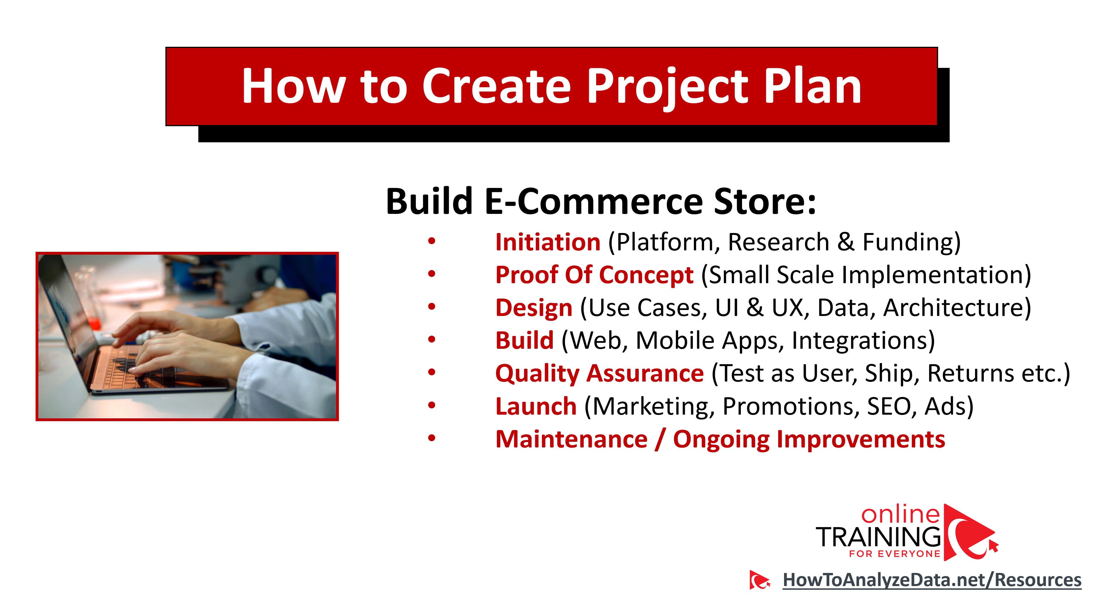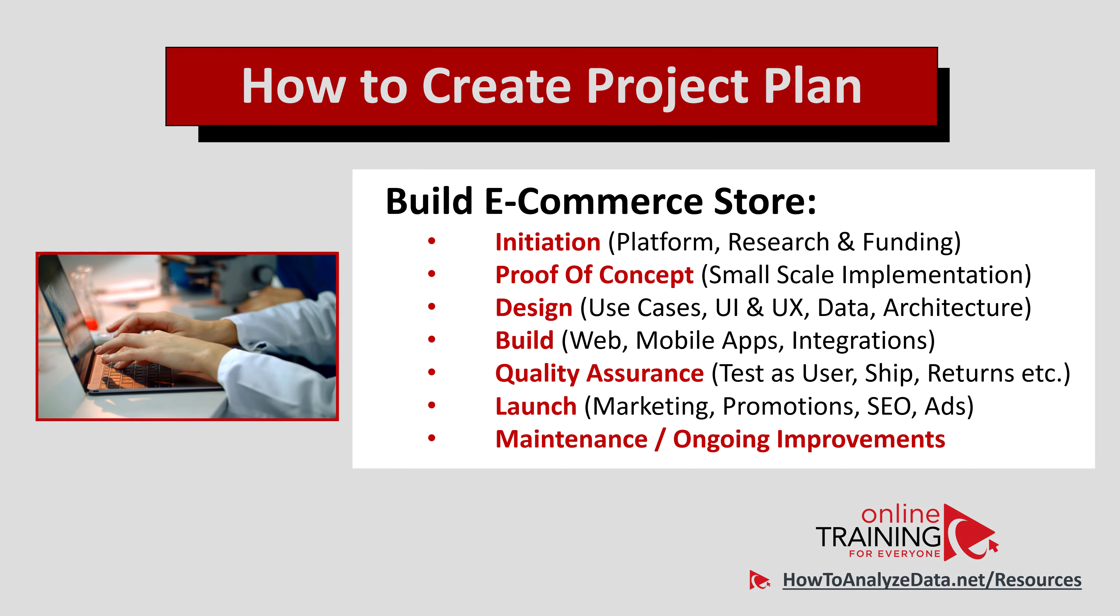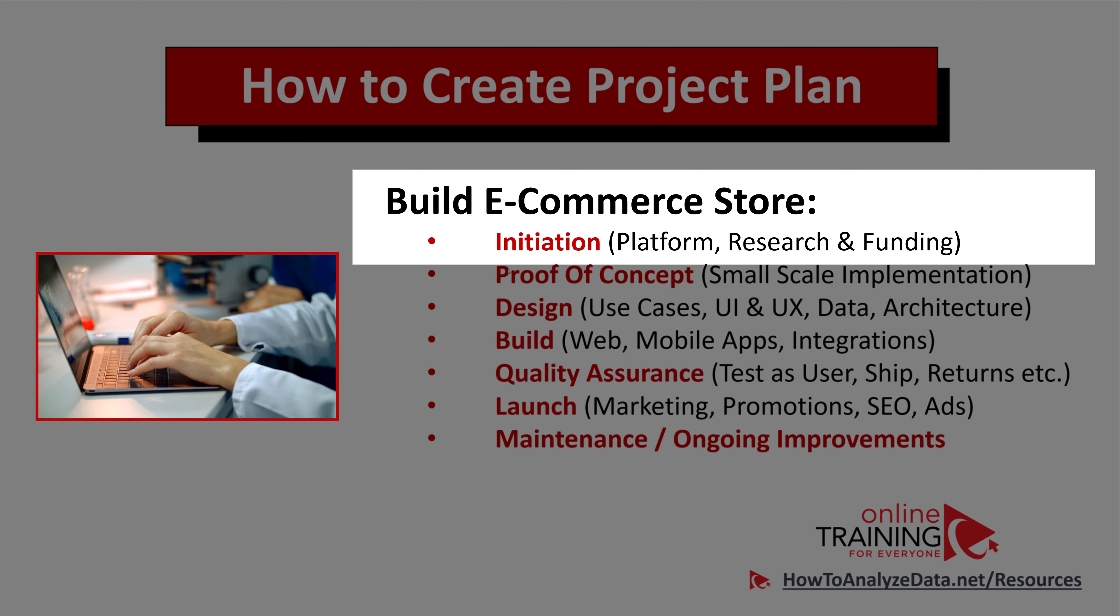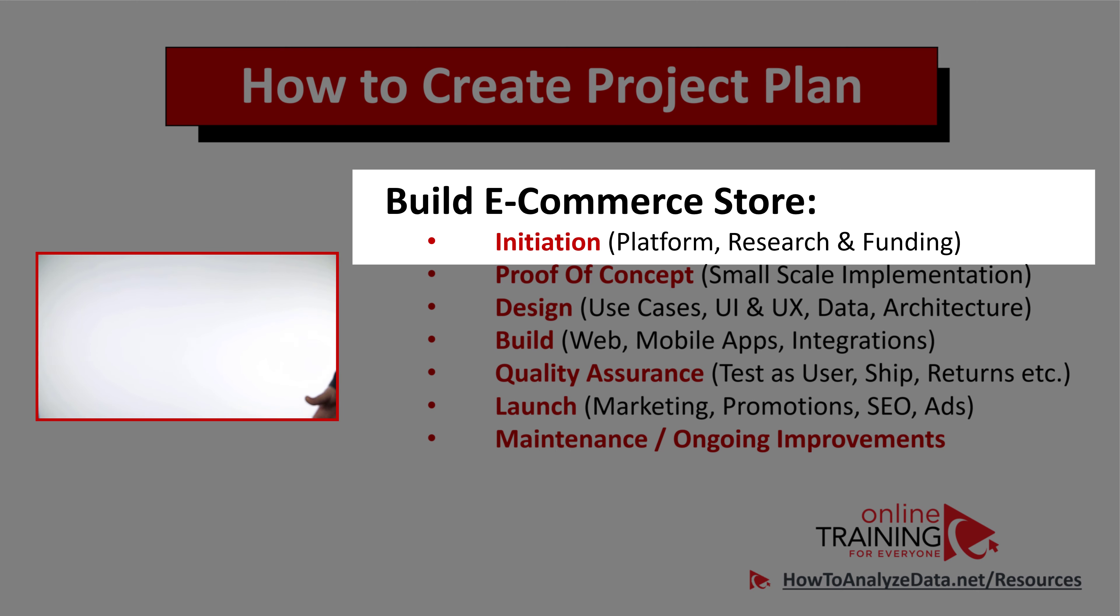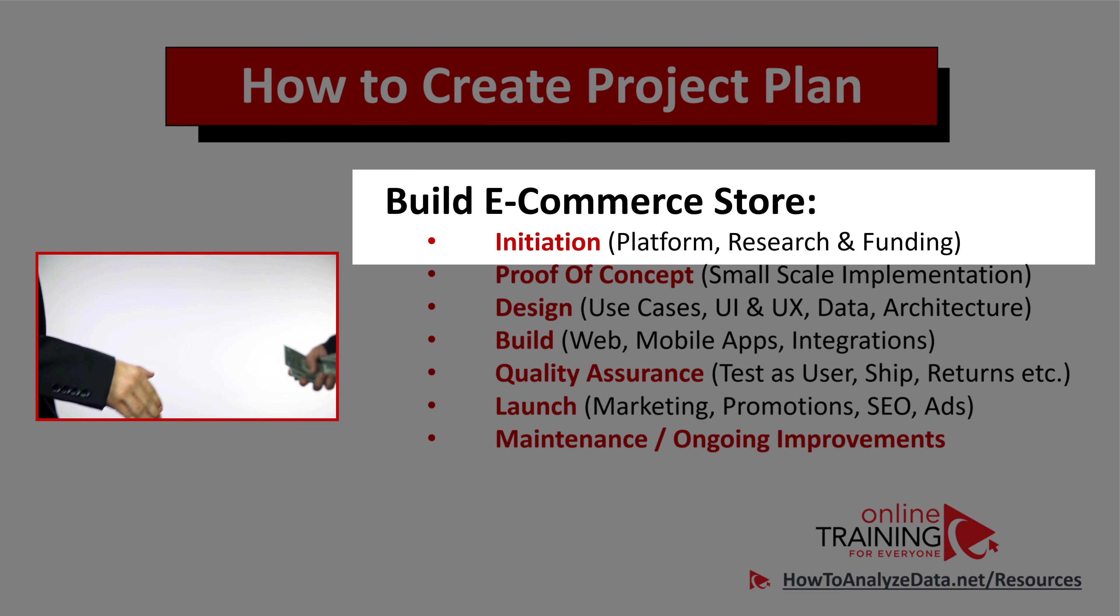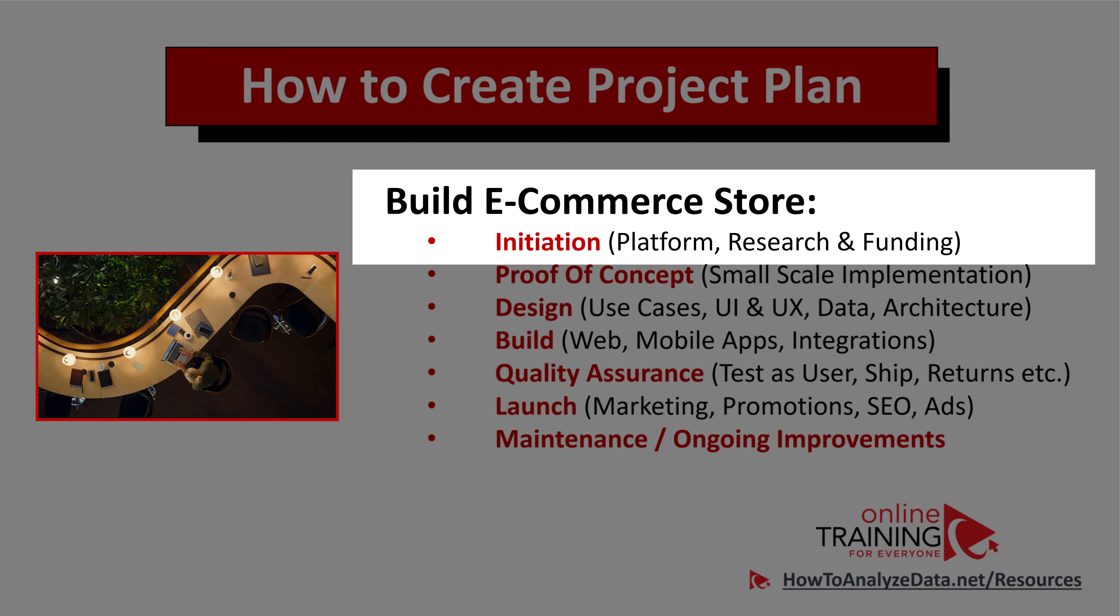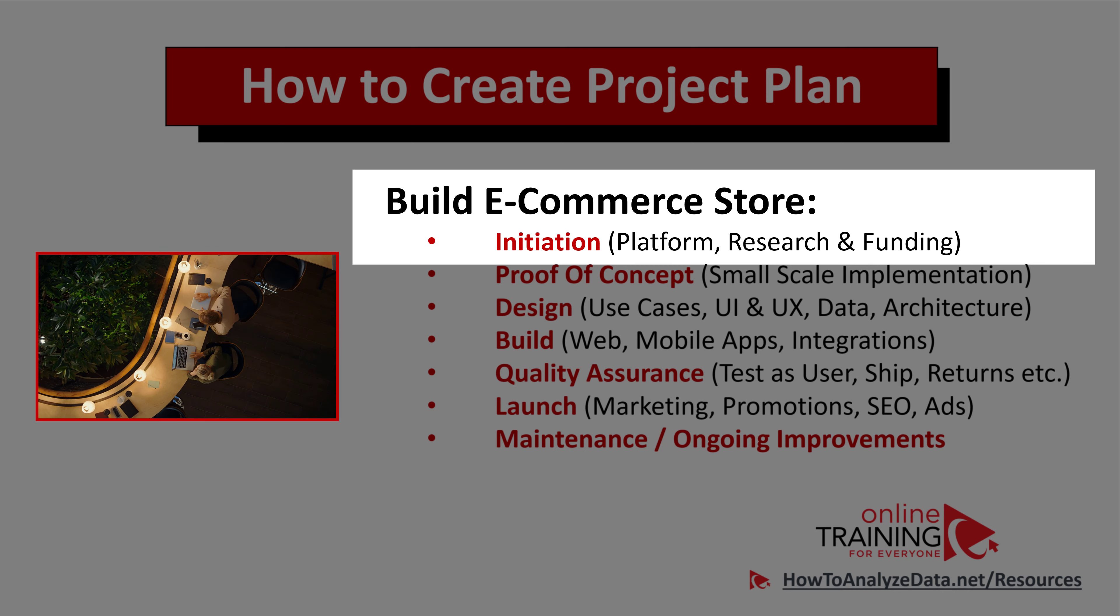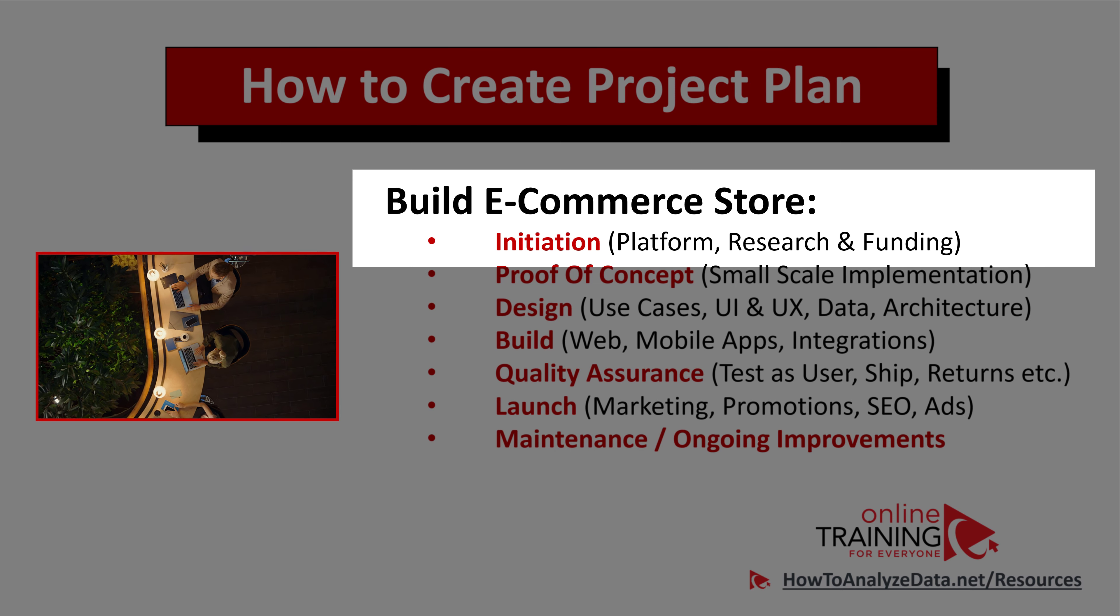Different activities are typically performed in the different phases of the project. For example, as part of the initiation phase, you typically research the platform, which might be an out-of-the-box solution you are trying to implement, and you also make sure that you secure the funding to run the entire project. During initiation, you also need to decide what kind of skills would be needed to successfully implement this project, and where would you find the right team members to help you.